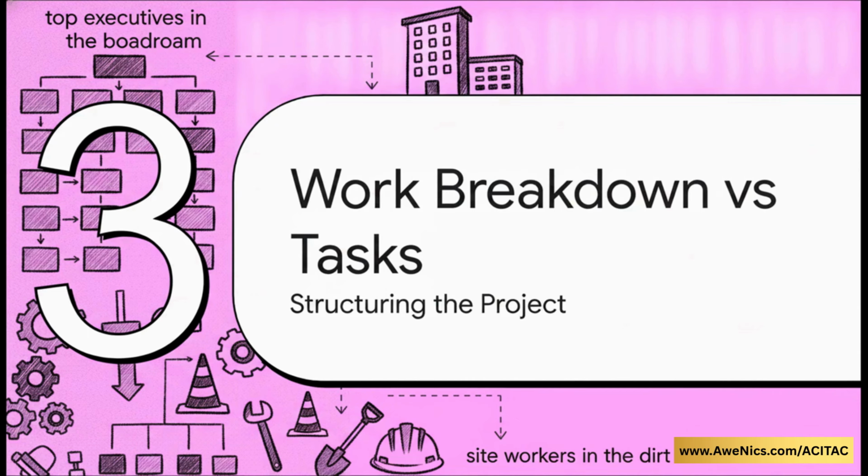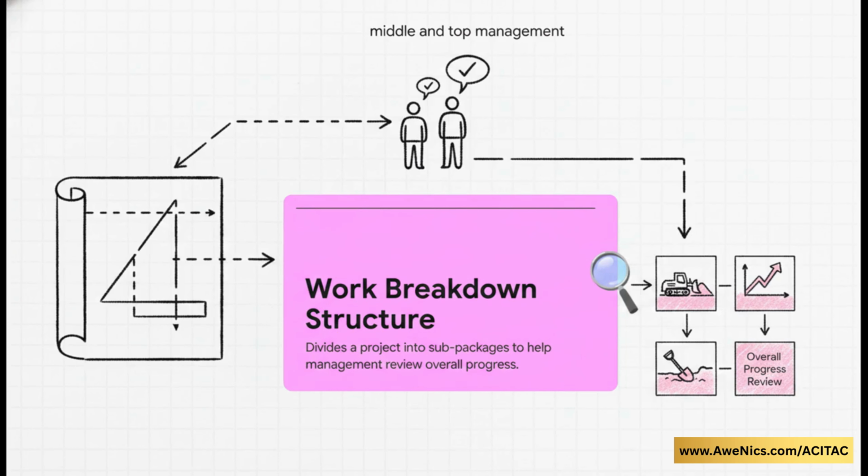This is all about structuring the project so that everyone, from the executives up in the boardroom down to the crew in the dirt, knows exactly what they're looking at. So the work breakdown structure, or WBS, is this really fascinating methodology. It takes a massive project and divides it into digestible sub-packages. Think of packages like site clearance or excavation. Now, to be clear, these are not the granular, individual activities being executed on the site. They are high-level, roll-up summary packages designed explicitly so middle and top management can easily review overall progress.